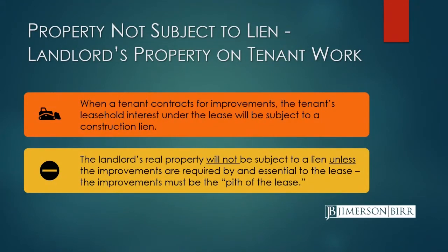Another quirk related to property that's not subject to a lien comes up in the tenant improvement context. When a tenant enters into a contract for construction work to do improvements under a lease, the tenant's leasehold interest will be subject to the lien.